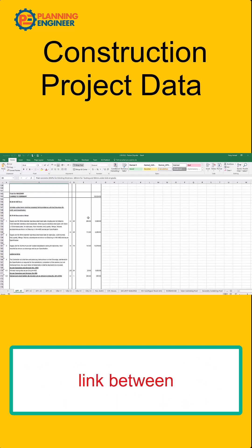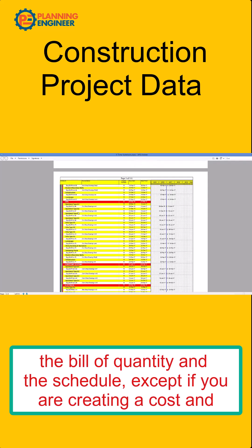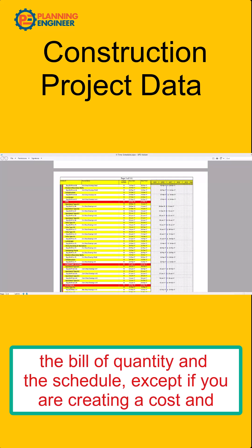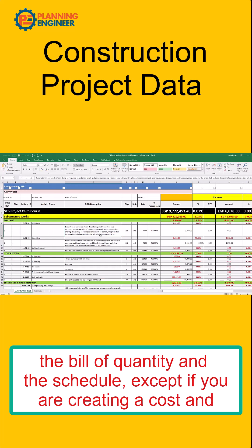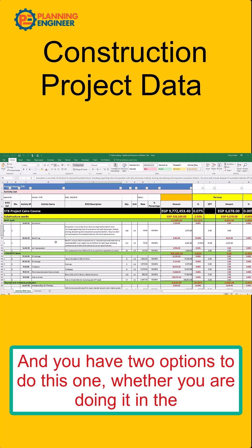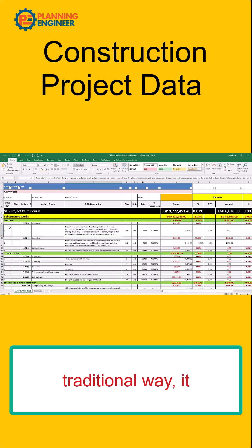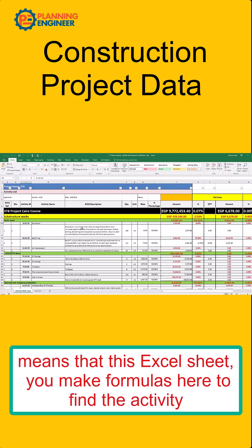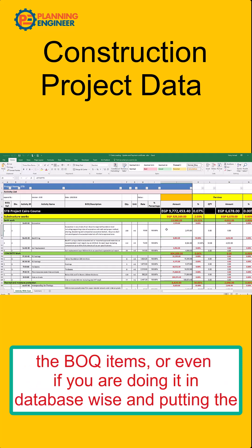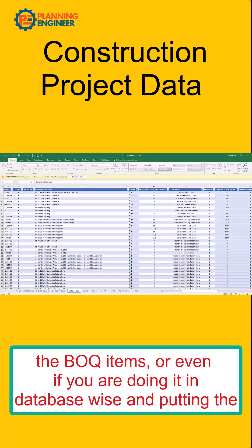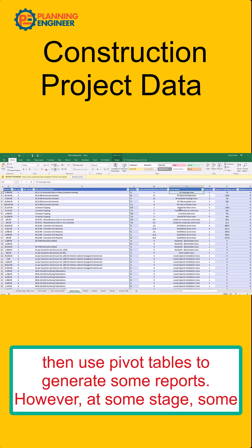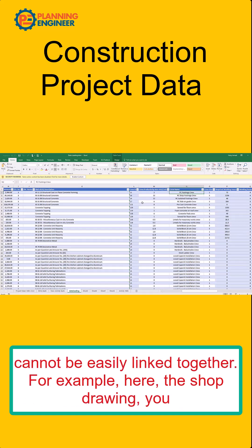There is no direct link between the bill of quantity and the schedule, except if you are creating a cost and resource loading. You have two options: either you do it the traditional way — using Excel formulas to find the activity values based on BOQ items — or you do it database-wise, using pivot tables to generate reports. However, at some stage, additional information cannot be easily linked together.